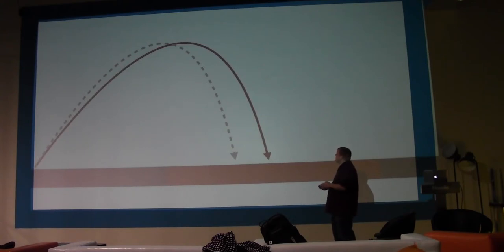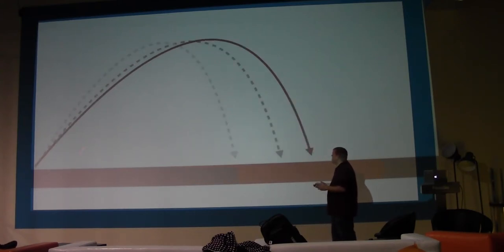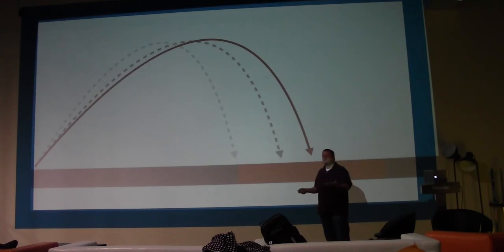Well, the advantage is that if you estimate your work regularly, in 2 weeks you say, okay, we got some stuff done, and we know the project a little better. Maybe after a couple sprints that margin of error will reduce a little bit, and where you're pointing will shift. You're able to get a feel for where this project's shifting. Are we staying pretty stable for the launch date? Is the project going faster? Is it shifting out? Over time, this margin of error will get smaller and it'll be a little more accurate.